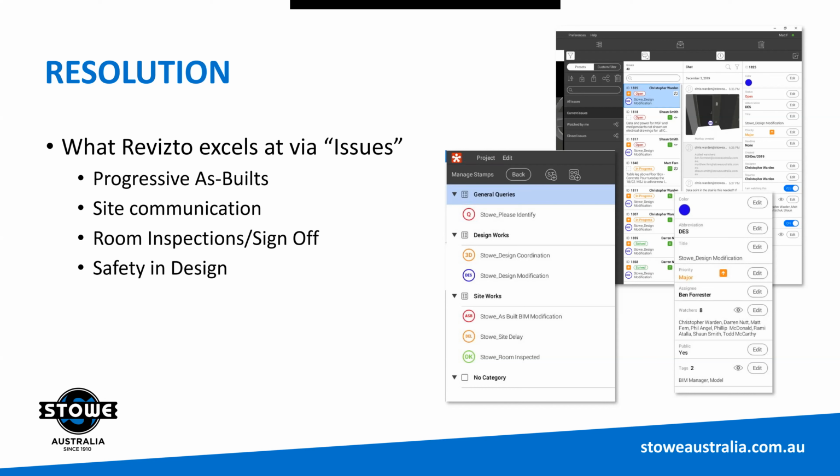If the room is completed as per the documentation, then we can internally tick that off. Now, that is just as important to us as seeing a room with modifications, because it means it's looked at, and we can then visualize at a later stage what rooms have been completed to the point of a sign-off being able to be completed.